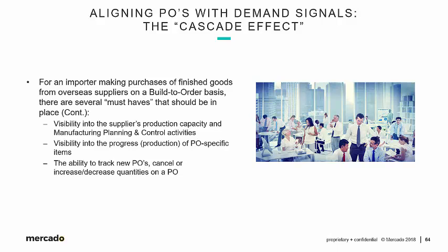And then it becomes really tricky from a timing perspective, because lead times can be 90 days, 120 days, even longer in an international supply chain. How do we make PO changes without blowing up the master production schedule of the vendor, without creating major problems with that vendor? We increase a PO that blows up their production capacity. We decrease a PO when the vendor already went out and bought all of the raw materials for the first PO. The timing of those cancellations and or changes are super important.